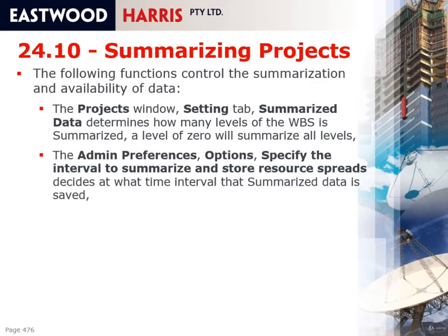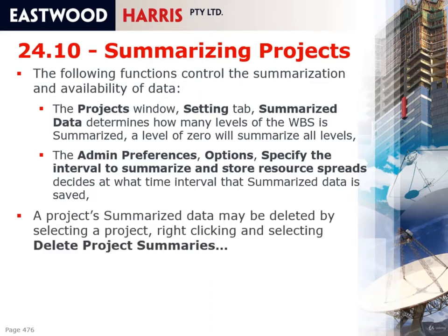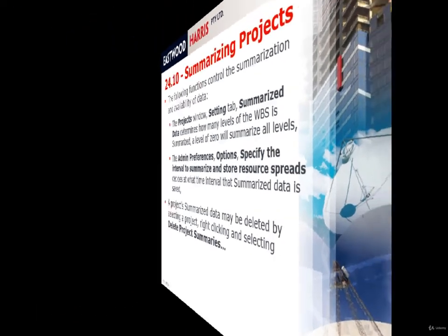And secondly, the admin preferences option specifies the interval to summarize and store resource spreads, and decides at what time interval that summarized data is saved. And don't forget, this applies to all projects within a database. Also, a project's summarized data may be deleted by selecting the project, right-clicking and selecting Delete Project Summaries.